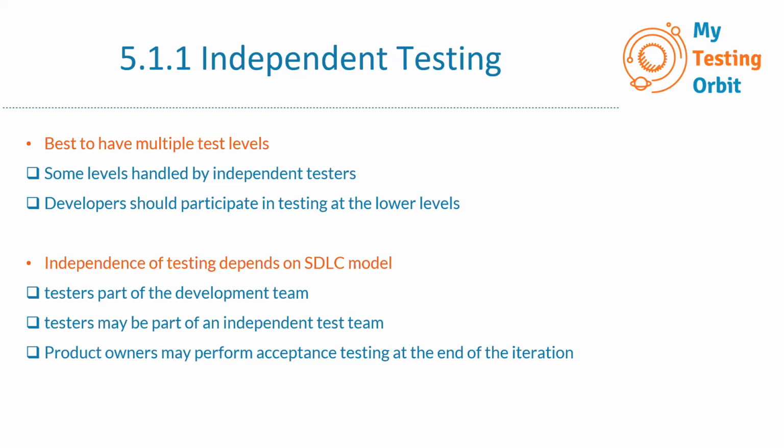So in waterfall projects, it's very easy to outsource testing because the requirements are quite well defined and well documented. There is very little risk of changes being made. So mostly it's a good candidate to outsource testing, because we can hand over all the documents and they can just design the test cases, execute them, and let us know the results back. So it depends on which SDLC model we are using.